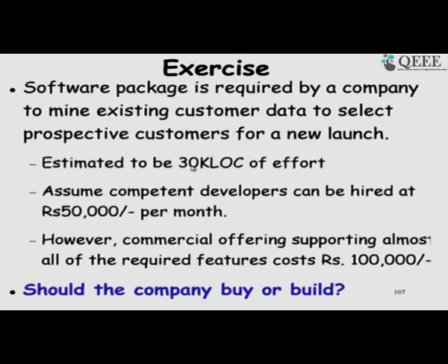You may try out on the calculator, or we will use a COCOMO calculator. So, 2.4 into 30 gives us 72, and then 30 to the power 1.05, you consider, it will become like 76 or something.